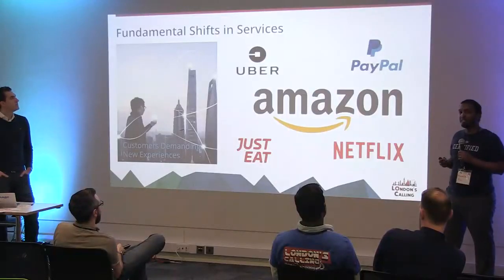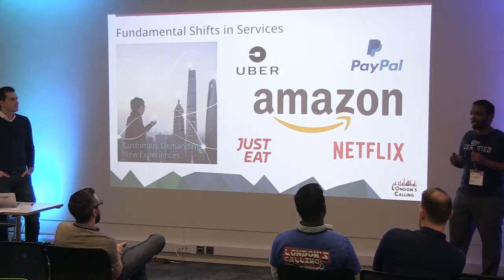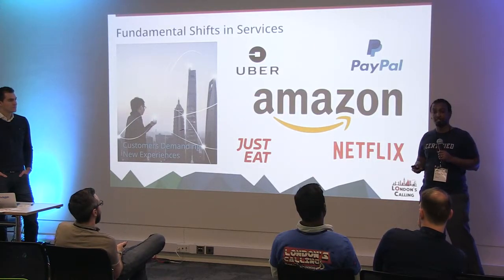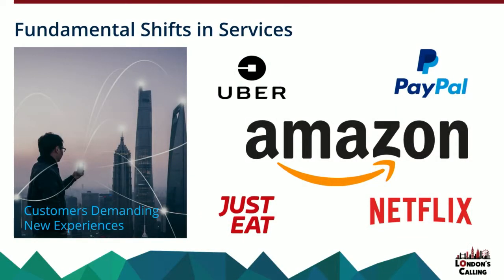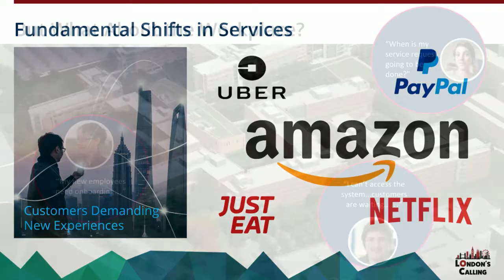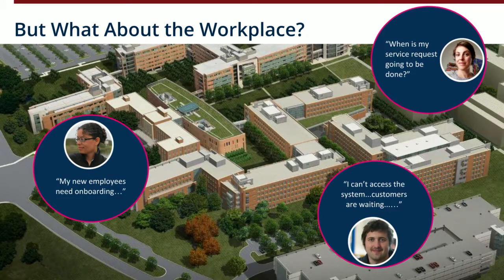Once you've identified the key stakeholders, you should then form a steering committee. Now, some of you might have a form of this steering committee. You might call it Center of Excellence or something else. But if you don't have it, even for a small migration project, it's useful to form a steering committee that has a diverse representation from all departments that are affected. This is obvious, but you need to engage all of the key stakeholders from the beginning, sharing everything that you've learned from the learning phase. The committee should ideally be headed by an exec sponsor, ideally a C-level exec sponsor. And the primary purpose of this committee is to ensure the success of the migration.